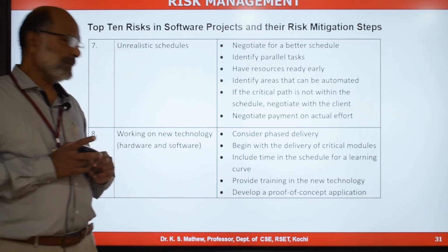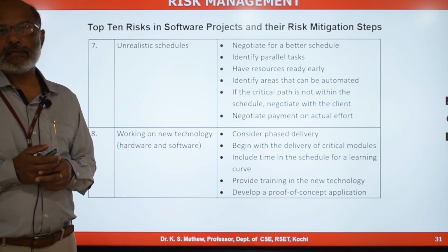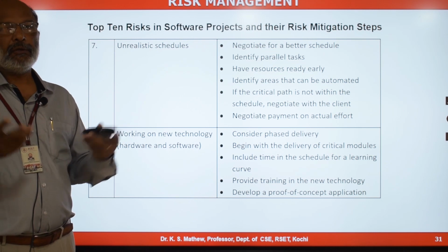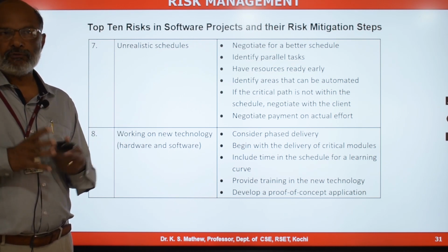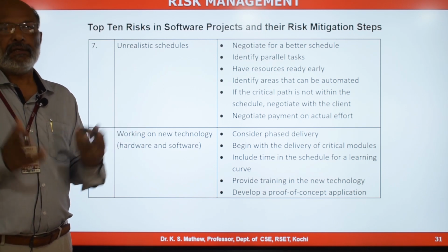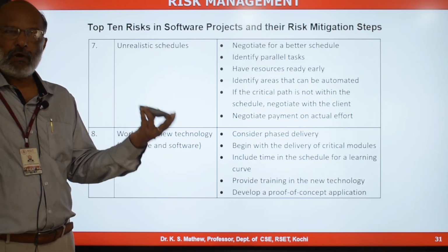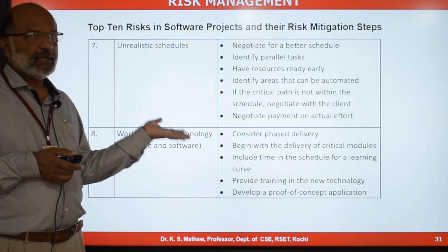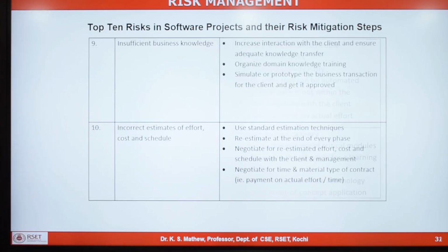Develop a proof of concept application, which will also help in avoiding risk related to new technology. When you are planning to use a new technology or tool, before going ahead with developing the actual application, try to do a POC and see whether your application can be developed using this new technology, whether it will work. So your POC can be developed to mitigate the risk involved in using new technology.